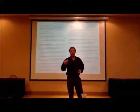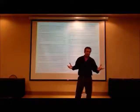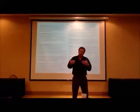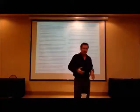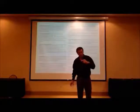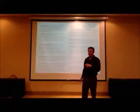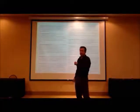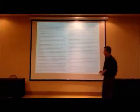And that's the cost. Now what I do when I'm sitting there signing the papers, I go, now how many weeks is this gonna take you? And they always wanna cut it short a little bit to impress you. Well, 5 weeks, I tell you what, I'm gonna give you 6 weeks, but you go past 6 weeks, that's a week longer than you just said. You go past 6 weeks, $47 comes off your final draw. Boom, thank you. Wasn't very loud, but at least somebody got it.